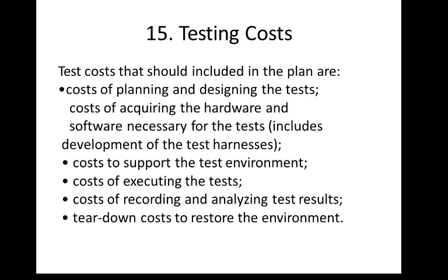And the next one is the testing cost component. In this section, the project manager, in consultation with the developer and tester, estimates the cost of the testing. That includes the cost of planning and designing, the cost of acquiring software and hardware for the test, the cost of support for the test environment, the cost of executing the test, and the cost of recording and analyzing results.